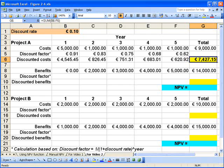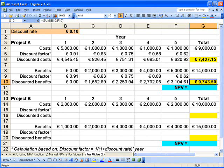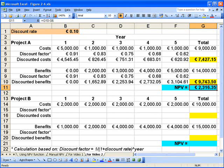We now apply the same discount factor to the benefits using the same formula on a year-by-year basis. The total discounted benefits work out at €9,743.50, compared with the calculated benefit of €14,000 — so the net present value of that is just over €9,700. When we subtract the discounted costs from the discounted benefits, the net present value for Project A works out at €2,316.25.